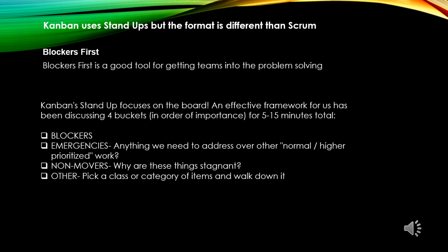Kanban uses stand-ups, but the format is different from Scrum. Blocker First is a good tool for getting teams into a problem-solving, action-taking mindset, and focusing on continuous flow during the stand-up. I've observed a number of mature Kanban teams that choose this as their primary stand-up format, because they only need to focus on blocked items and trust the Kanban board to silently communicate all other work items. This requires a high degree of trust, transparency, and discipline.